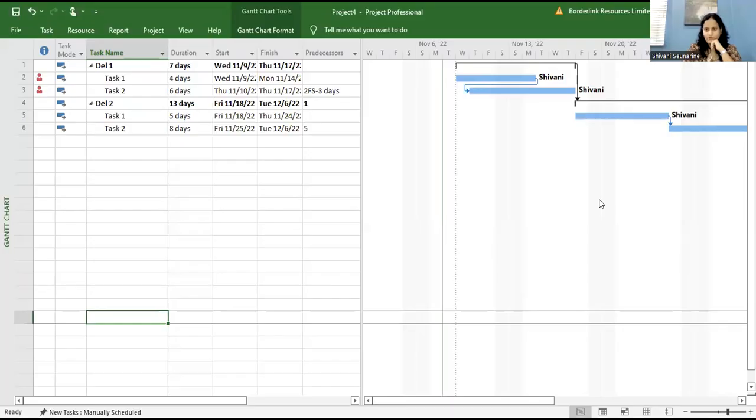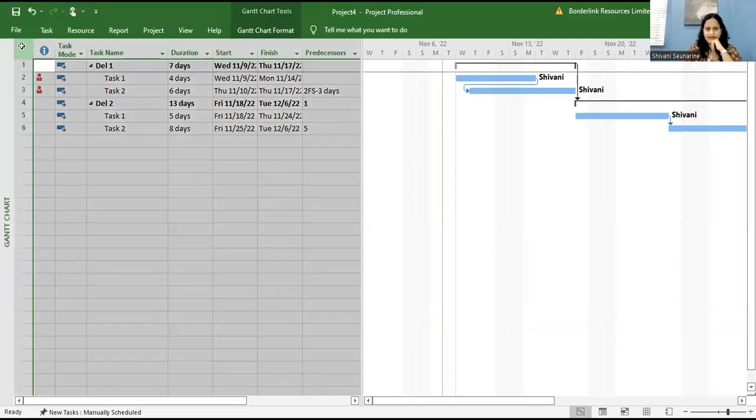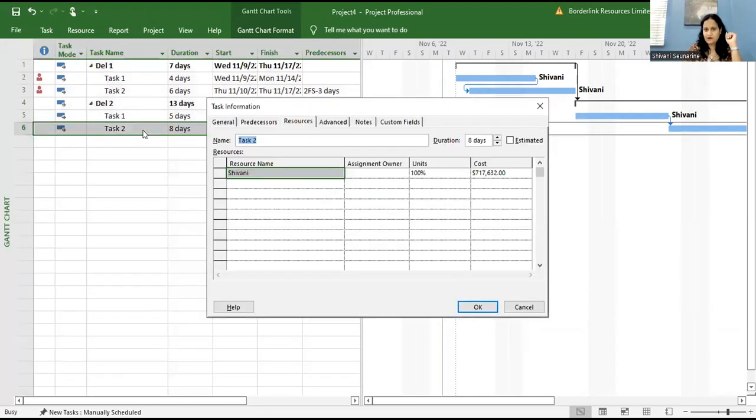What I found, for example, let me just pull back up my screen quickly. What you were saying here, you could just simply highlight everything, right? And when you highlight it, you go to link the task right there. And when you link afterwards, you could go to every single activity and actually set the predecessor if it's different. Usually I'll just do one by one. Great, but you could do it that way too. A faster way would be to highlight everything, link it, and then adjust it. Excellent. Good.